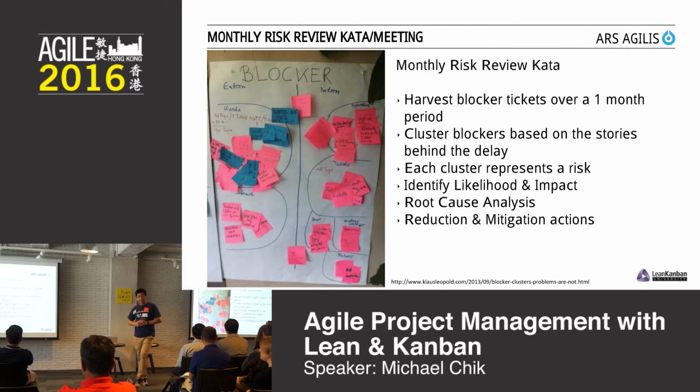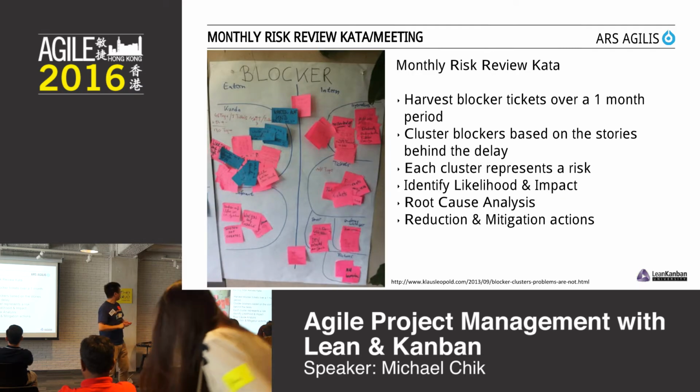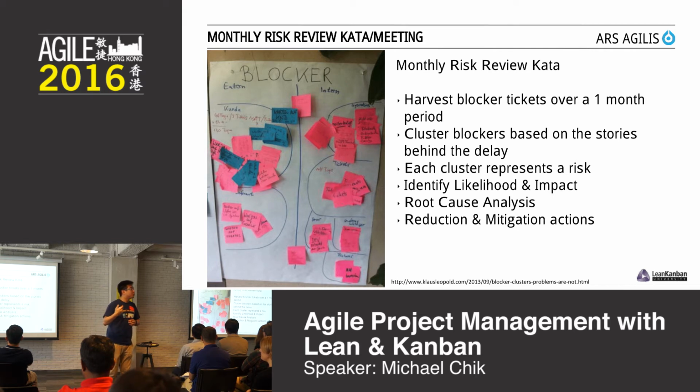Very much. This is another very good technique. So once a month, or maybe once every 2 weeks, depending on how many blockers we get, I just take all the blockers and I group them. And then we do a retrospective just for that. Or we do root cause analysis on the one that impacts us the most. Again, the goal is to get rid of all those long tails that you have in the statistic. If you get rid of one, suddenly your lead time improves drastically by 40%, depending on why you have this long tail.